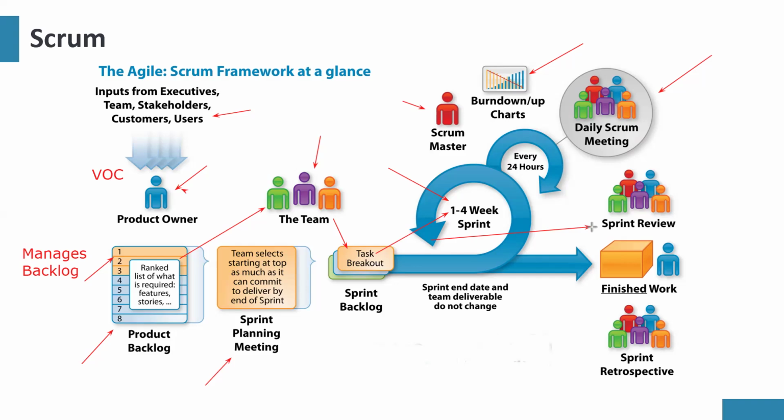And when they inspect, they can give feedback by which we adapt, inspection and adaptation. So sprint review is where we get feedback on the product. We put the product into the hands of stakeholders, and we get feedback from them. And then we can now decide any modification we want to do.